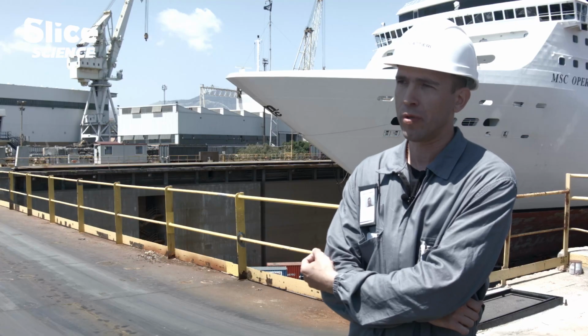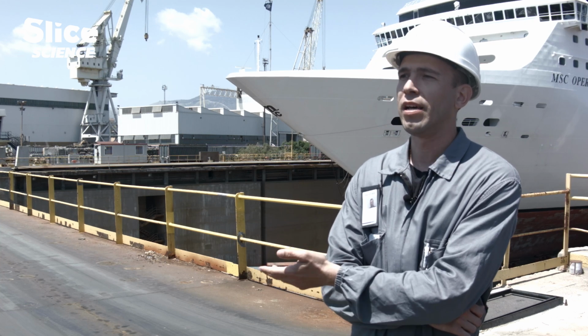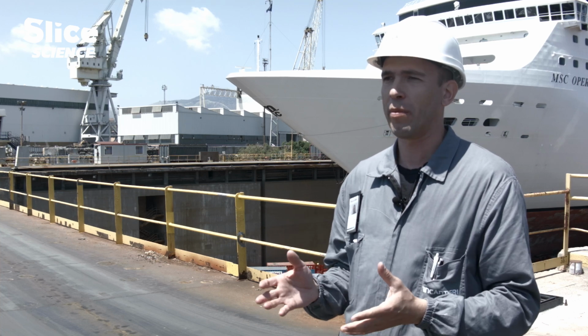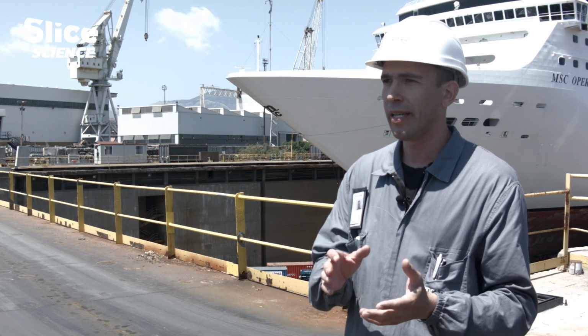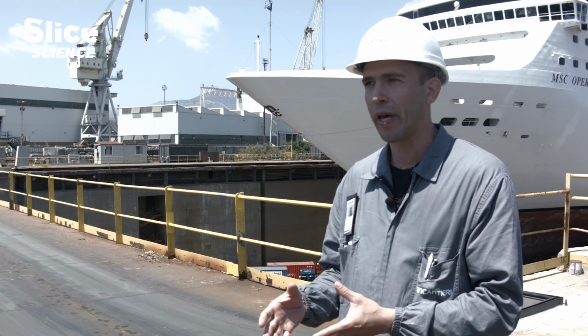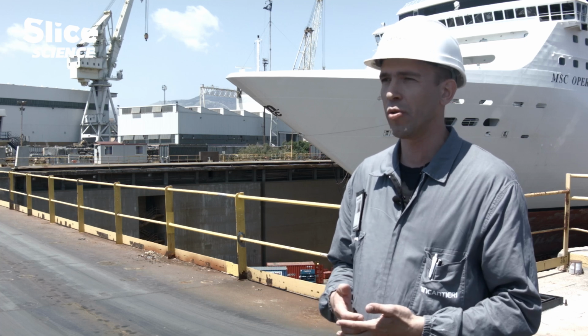Also, for the cutting of the ship, well, we can split it up into 2 phases. All the preparations for lighting the blowtorch and cutting the ship start when they remove all the fittings. When we say fittings, we mean the cabins, the beds, the mattresses, the bathrooms, the carpets. Once all these things are all removed, we get down to the raw metal of the ship.